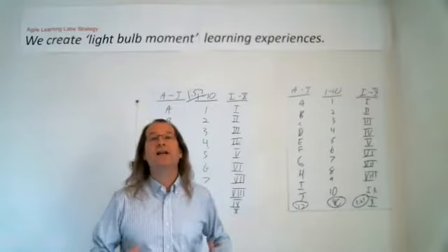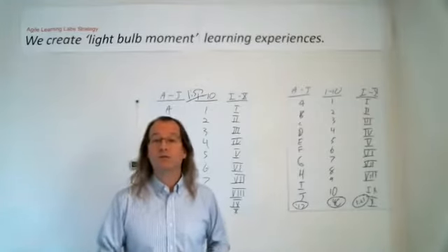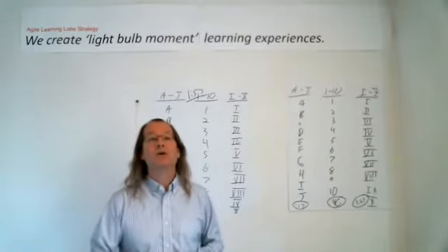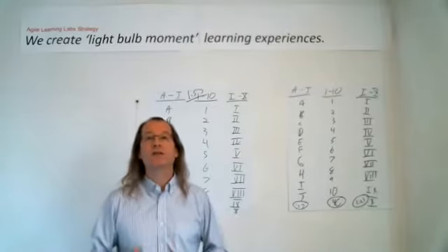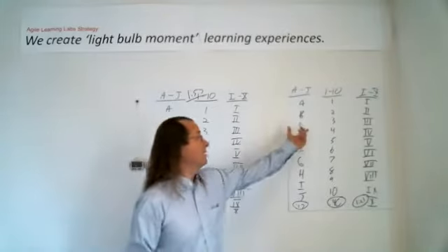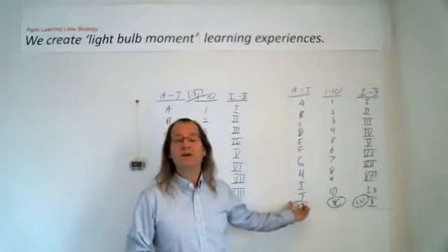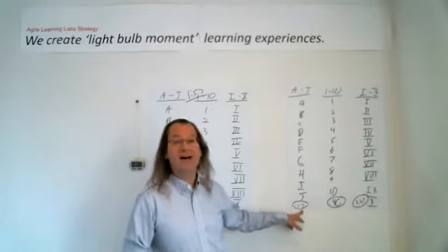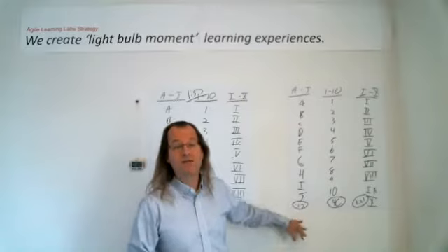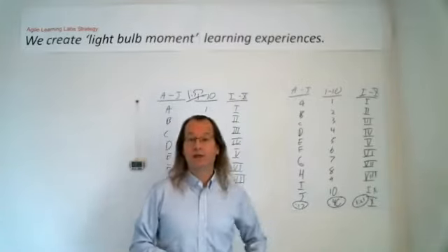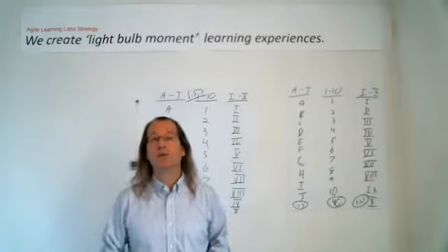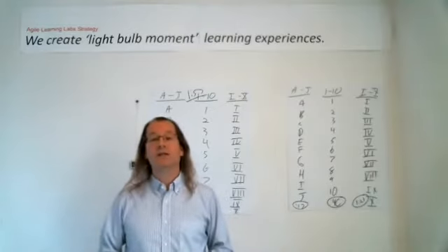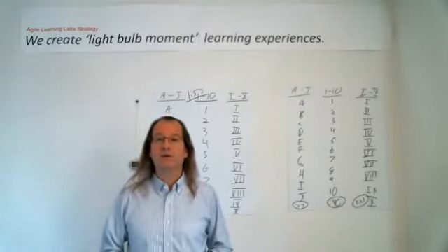Not only is there value in getting things to market sooner, so we can capture customer value and market value, but there's also a lot of value in getting things to market early so that we can start to get feedback and do product discovery, right? What if by delivering this list, we find out that these kinds of lists aren't what our stakeholders or customers really want at all? Wow, we'll discover that 17 seconds in, maybe a little bit after we ship it. And then we don't even have to do these other things, right? We can spend the rest of the time doing something that's what they really want, as opposed to investing 2 minutes, delivering all 3 things all at once and then discovering that's not even what the market wants.